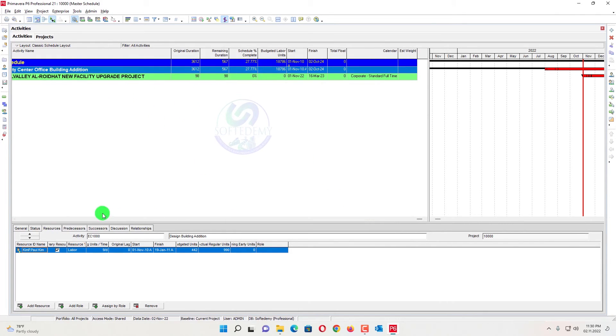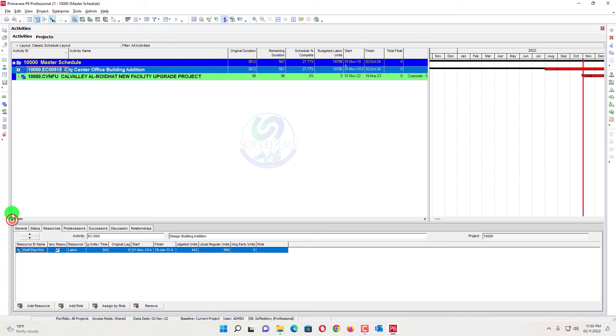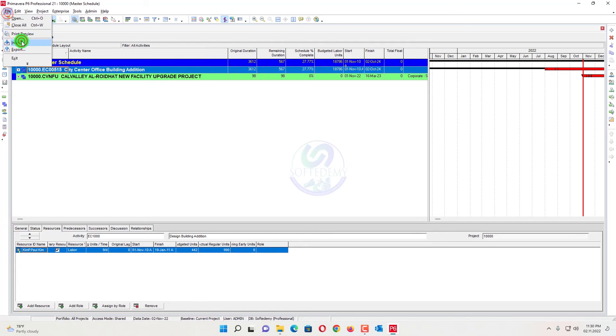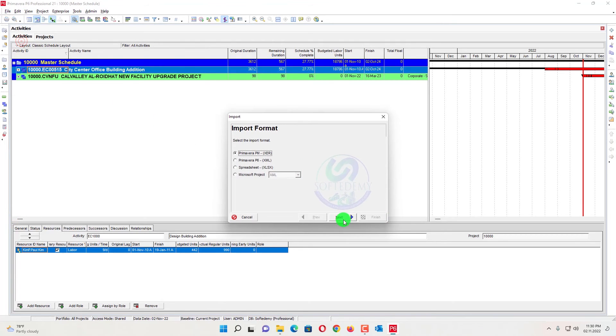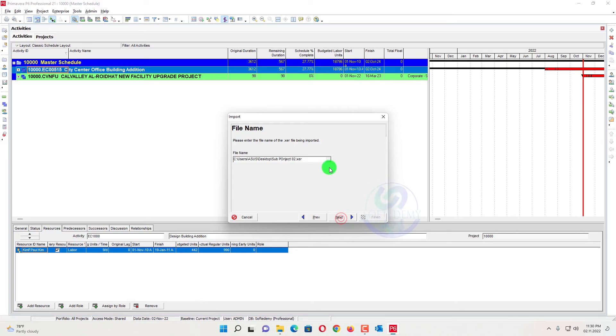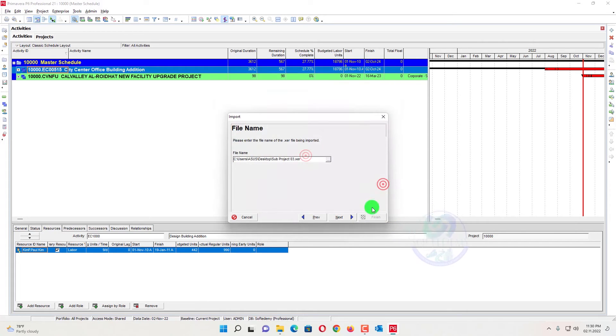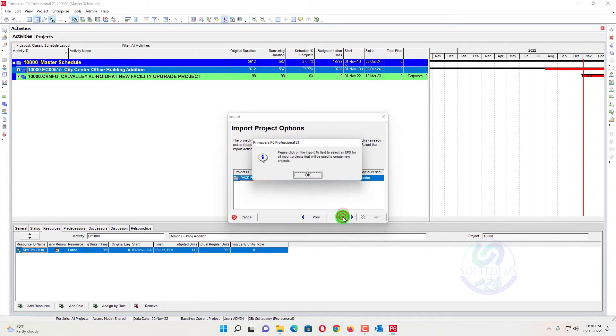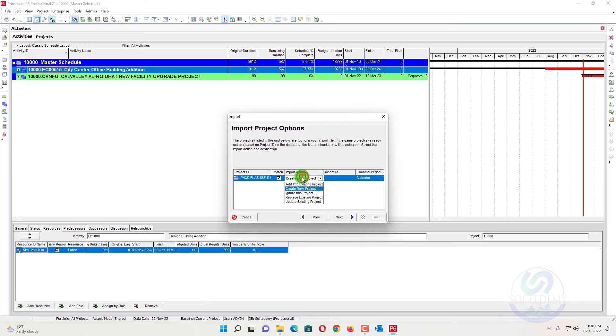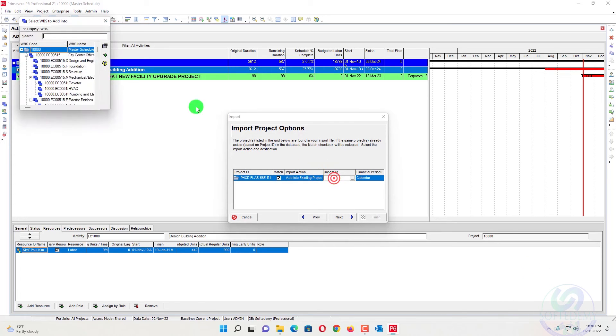Now the third one, can you see here? Also go here, import XER, next, next. And the third one, I will select the project. Open, next. Okay, so I was making a mistake. Add into existing.